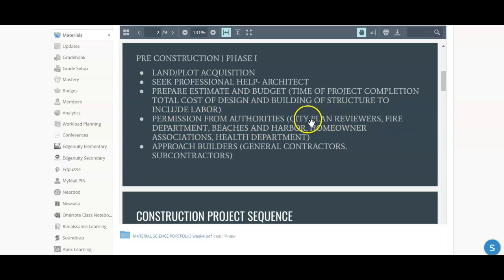When you drop it off to the city, they have city plan reviewers, which are people that were architects, or still are architects, and engineers. And so engineers will check out the engineering plans and the structural plans, mechanical, electrical, plumbing, all of it. And they want to make sure that people aren't cutting corners or designing right according to the building code. And if you're missing something, obviously, more eyes that see it, the better. So the city will let you know, like, hey, you're missing this, that on the plan. Go ahead and put that on the plan and resubmit.